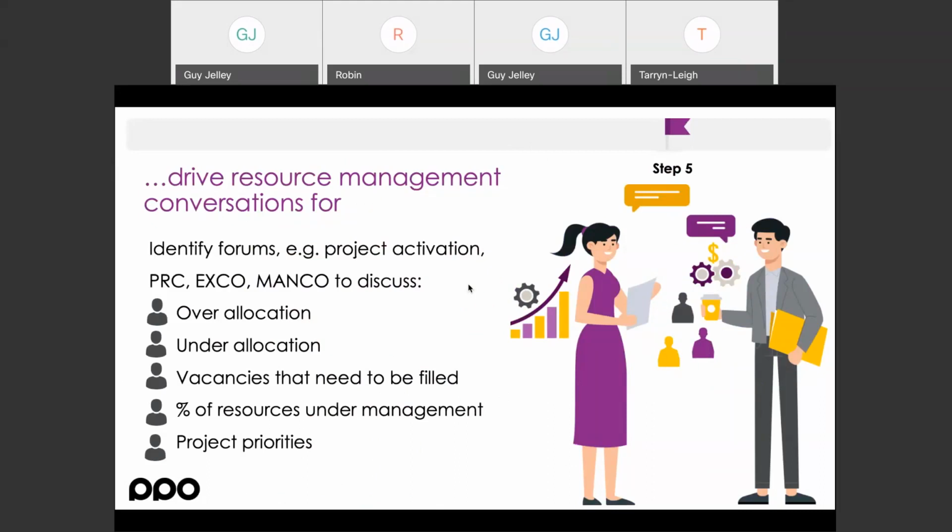We tried in the past to create resource management forums and try and develop processes and try and get business to buy into a way of work and a process and all the rest of it. But because they didn't see the problem, because we didn't have enough data to visualize it, it was just something that they felt the PMO was doing because the PMO needed to do it. Everyone knew that people were busy and everybody knew that there was maybe too much going on, but they couldn't visualize it and see it. We knew it, we heard it, we understood it, the project managers told us about it, but we approached it from a process discipline point of view, as opposed to, here's the picture, this is why it's bad, now let's work with us to fix it.